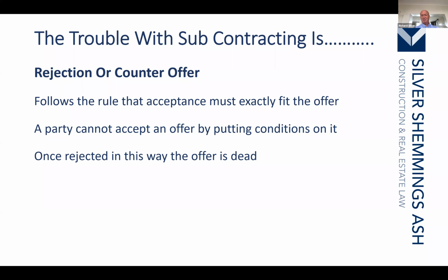The subcontractor submits their tender and says on the back of its terms that its terms will apply to the tender. Having received the tender, the contractor then sends an acceptance, but stating its terms apply. Well, it's not an acceptance. Even though it says on the top of the form, subcontract order, it isn't a subcontract order. It is a counteroffer.